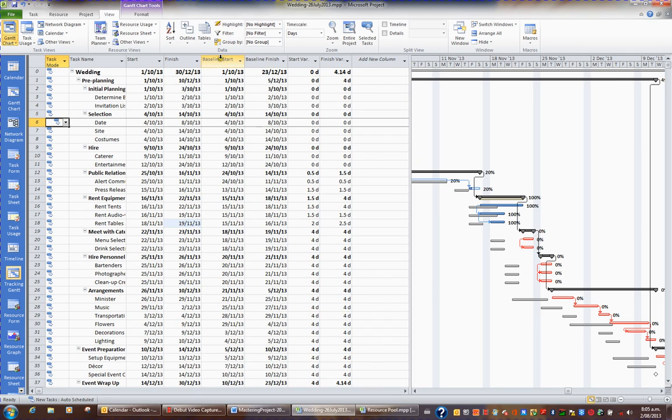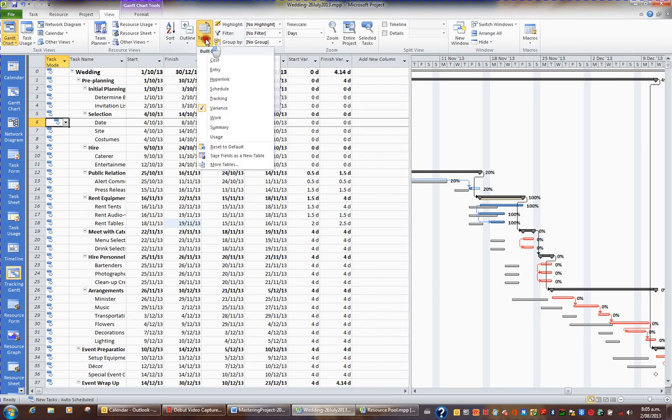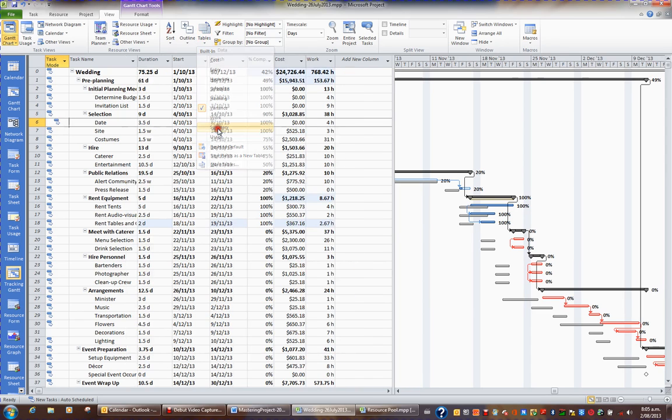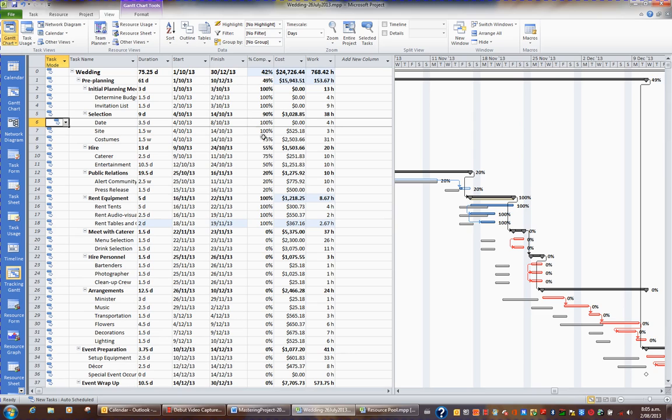Another useful table, if I go back to the Tables button in the View tab, is to have a look at Summary. Summary, for example, has the percentage complete of the entire project in various tasks, and also the cost and work information.